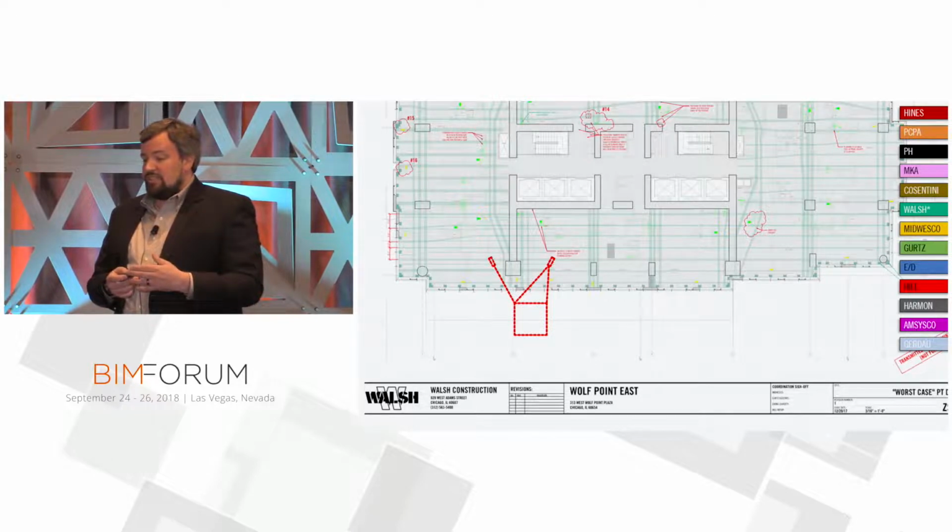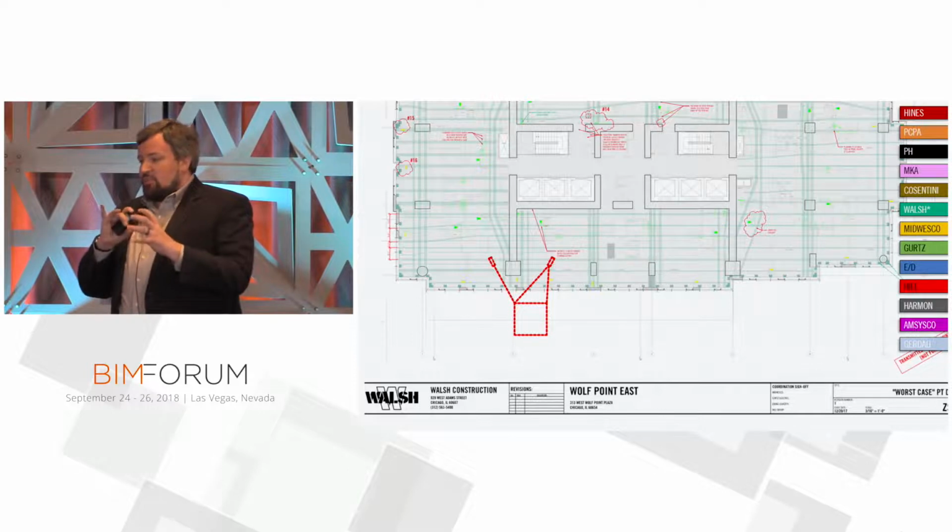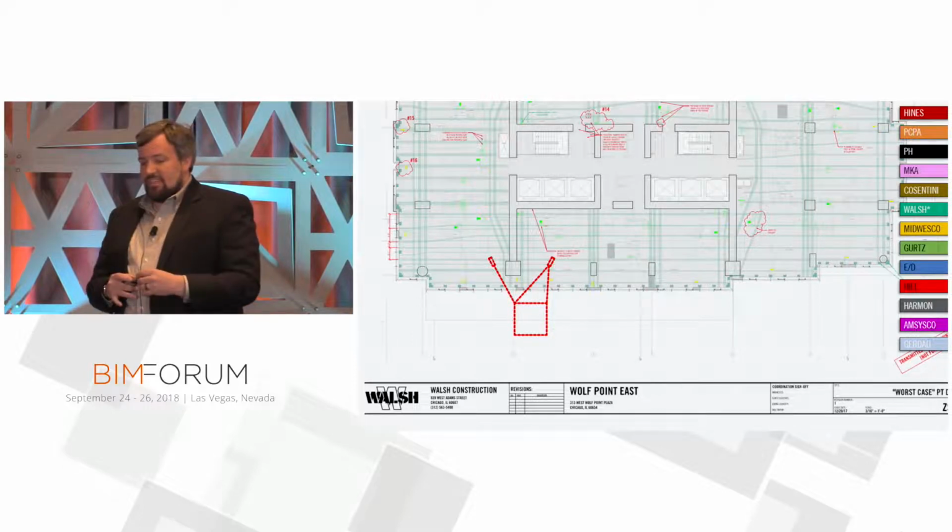And then also reaching out to the curtain wall team, because as you saw during the wind study, this is a huge wind tunnel that we're building inside of. So they don't have a lot of flexibility with those dark green embeds along the perimeter of this slab, but that also constrains where the PT can anchor off. And then, because we have random zones of rebar, our rebar busters are involved, and why not? Let's just talk about crane logistics, and we're going to pin through the slab at this. So you're looking at version 5 of this drawing, but we did eventually manage to get through it all.